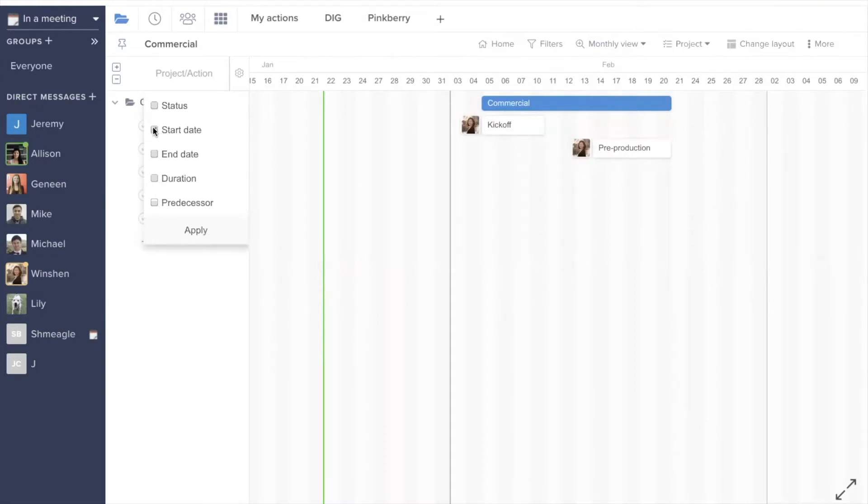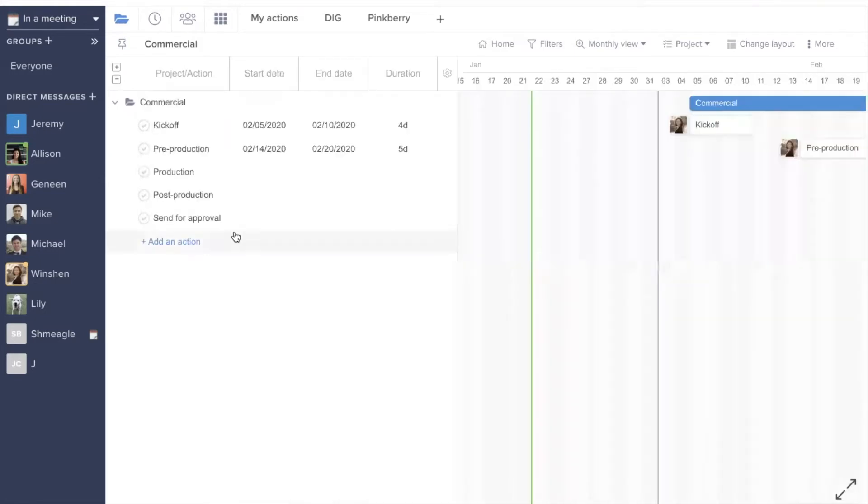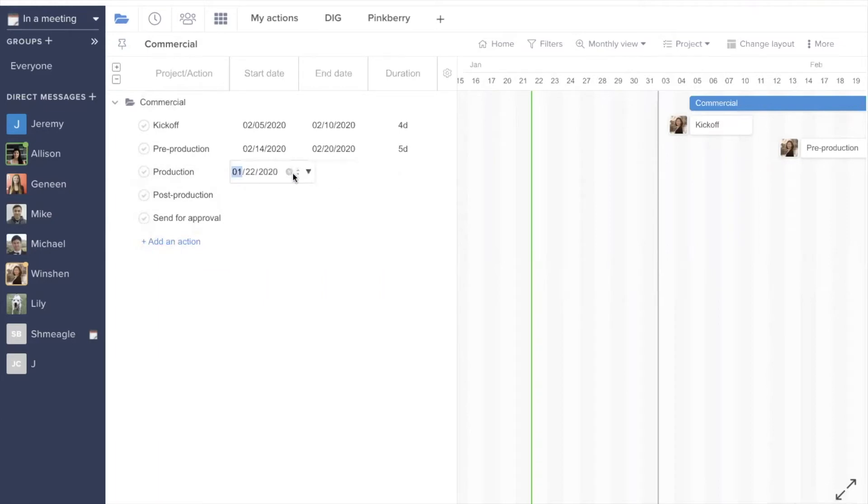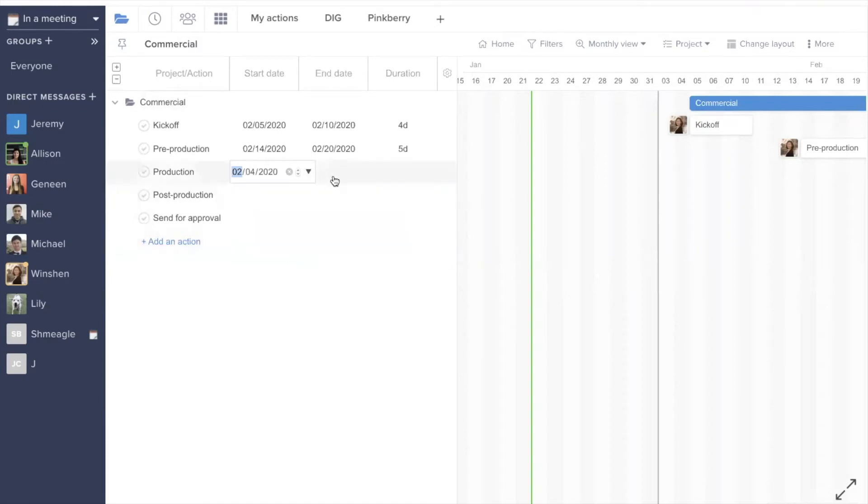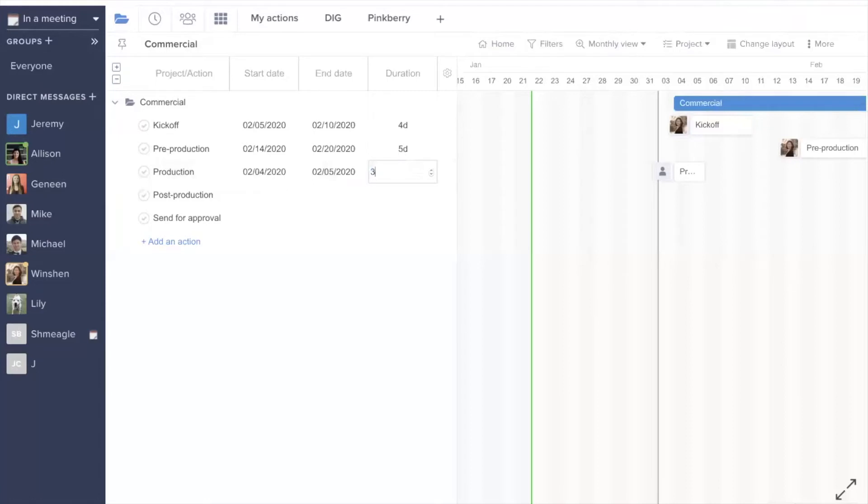For this example, we'll use start date, end date, and then duration. From here, you're able to manually adjust the dates on which you'd like the tasks to fall. Those changes are then reflected here on the Gantt chart.